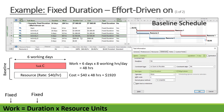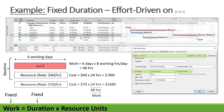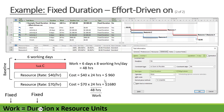After baselining, if we assign an additional resource to task C at a rate of $70 per hour, our duration remains fixed and our work remains fixed at 48 hours. Each resource now works 24 hours. Resource one: 40 × 24 = $960. Resource two: 70 × 24 = $1,680. The total cost is $2,640 after adding the additional resource.